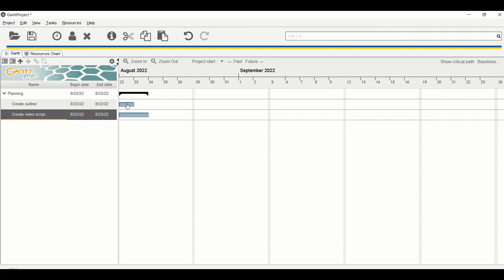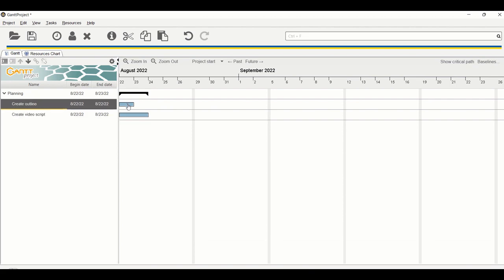To add a relationship, point to the first task, then drag and hold the mouse. You will see the black arrow here. Drag and hold the mouse and point it to the second task, and you can see that the relationship will be created.